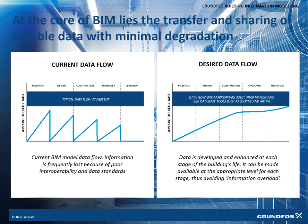These charts illustrate that by applying BIM technology, we move from a typical flow where information is accumulated in a building process and then we start over from scratch at handover. Whereas with BIM and the desired data flow, we have a gradual increase of information from inception to operation. Data is developed and enhanced at each stage of the building's life, and it can be made available at the appropriate level for each stage — thus we avoid information overload.